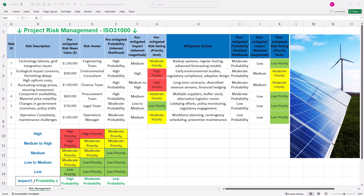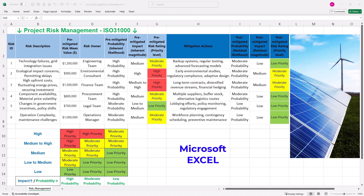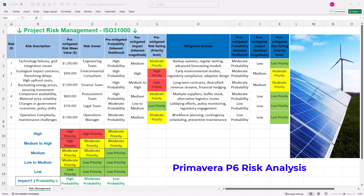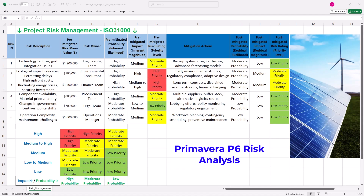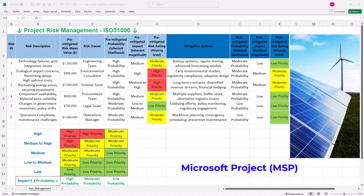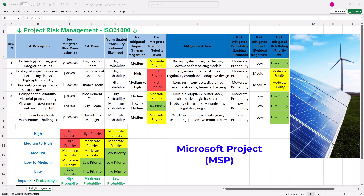Step 4 is comparing risk management in Excel with other risk software. Comparing Excel with dedicated risk software highlights trade-offs between flexibility, cost and specialized functionality. Excel remains a go-to tool for many organizations because it is widely available, highly customizable and familiar to most users. Its dynamic formulas, pivot tables and conditional formatting allow for fully dynamic risk matrices and dashboards. Primavera P6 Risk Analysis is engineered for larger-scale construction and engineering projects, offering sophisticated risk modeling, Monte Carlo simulations and scenario analysis that integrate directly with project schedules and cost data. Microsoft Project integrates risk management into project planning, tracking risks together with tasks, dependencies and resource allocations for a more holistic view of project health, facilitating proactive mitigation and streamlined stakeholder communication.